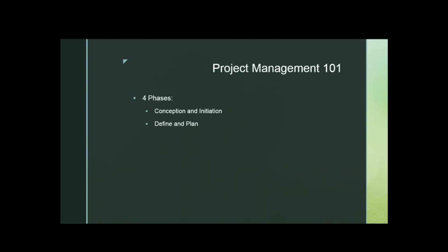working towards. It's important when you're doing this to think about evaluation. We always think about evaluation at the end, but really evaluation should be in the very beginning steps of your project. And maybe you already have some kind of needs assessment that you have done, or you're going to do one right off. So that gives you a baseline, a starting point for your evaluations later on, so you can compare and see how things went.